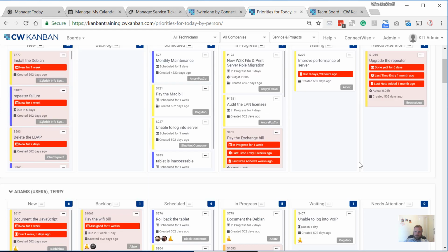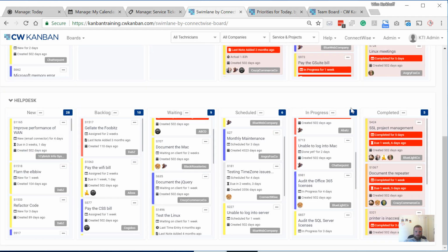Daily huddles are focused on moving work forward and engaging team members or management to resolve anything slowing down work. And then after the huddle, they can go and resolve that issue. As you decrease the amount of work stuck in the system, work flows through much quicker, and thus SLA performance is naturally improved. So even without complex KPIs and SLA metrics and dashboards and such, they're going to improve, and clients will be happier. So here's 3 examples showing some of this.